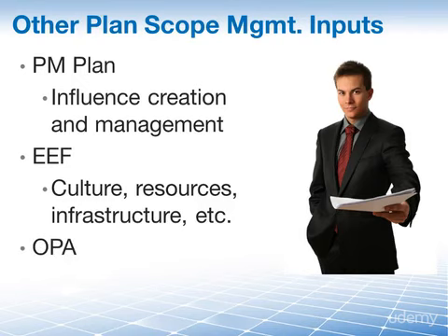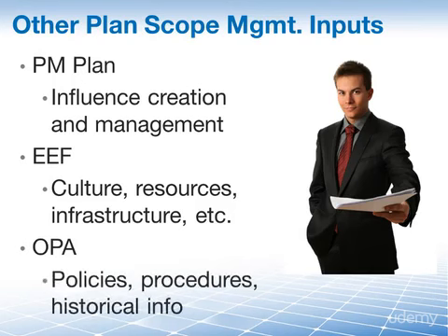And lastly, the organizational process assets, like policies and procedures and historical information from other similar projects, can help shape our scope management plan. Maybe there's even a scope management plan from a previous project somewhere in a template library. Using all of these inputs helps us make sure that our scope management plan in the end is going to be in line with all the important aspects that help us define our scope.